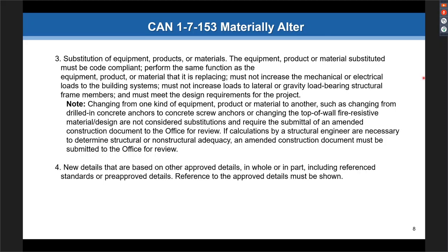And so that was allowed to be done as an NMA, because all they're installing is the same infill for that window, and all they're doing is adding the patching of existing material on there. If this happens, the same one was also applied to a door, and now that is no longer non-material because that door has a different type of framing and different requirements for that infill.